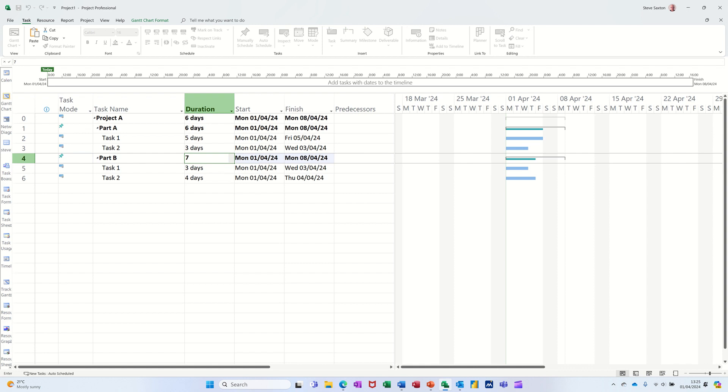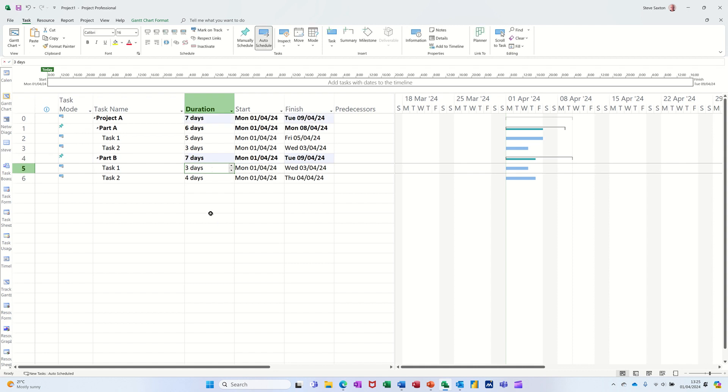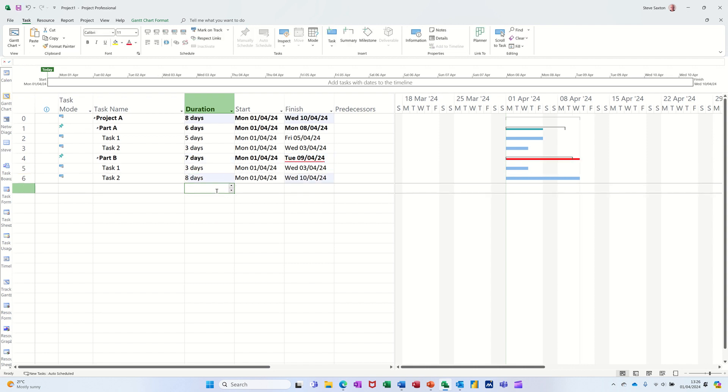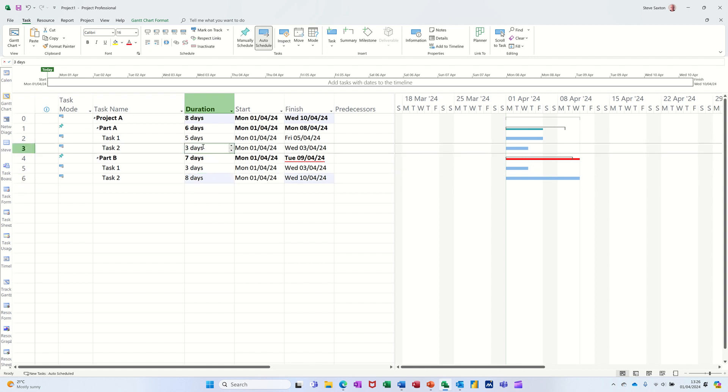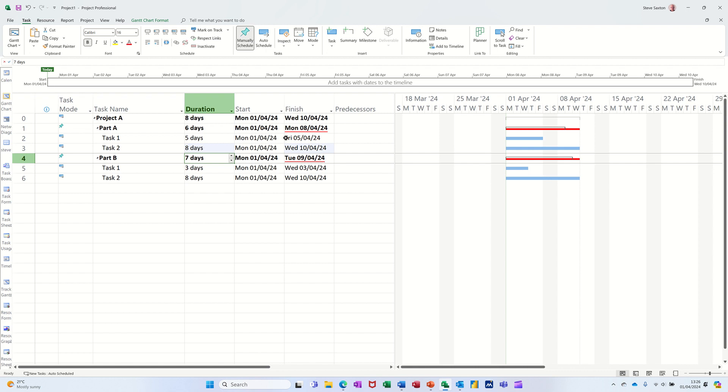Now if I put seven days there, I've got seven days, it hasn't updated any of this. If I type on there, if I put eight days there, what I've got now is a conflict because this is saying eight days, that is saying seven. If I do the same at the top, if I go eight, I get the red lines appearing. Now my personal view is if I look at a project plan and I see these red lines, that's ringing alarm bells in my head. I want to know why that's the case. I'd then be looking at a task mode, is that being put on a manual setting on purpose or is that because somebody's accidentally typed on one of these summary tasks, so you just have to be careful.